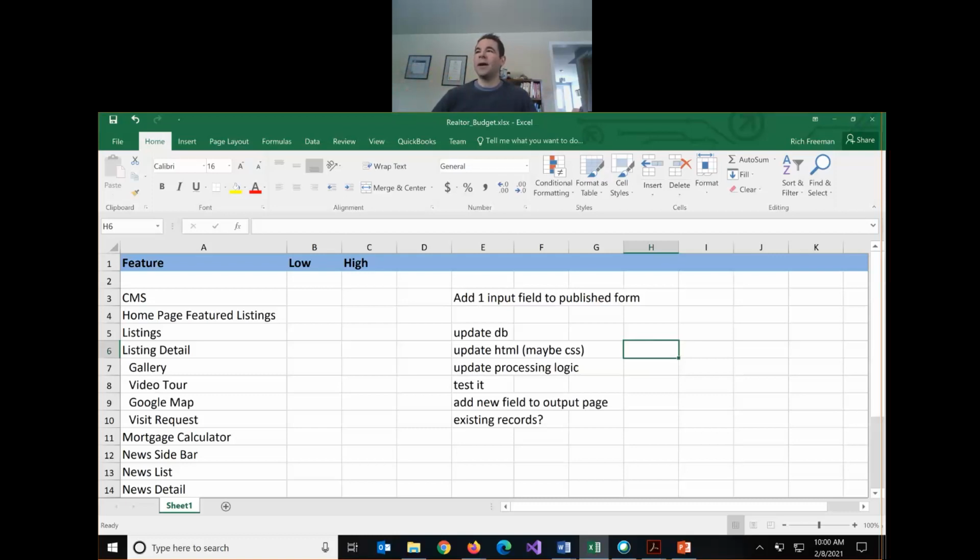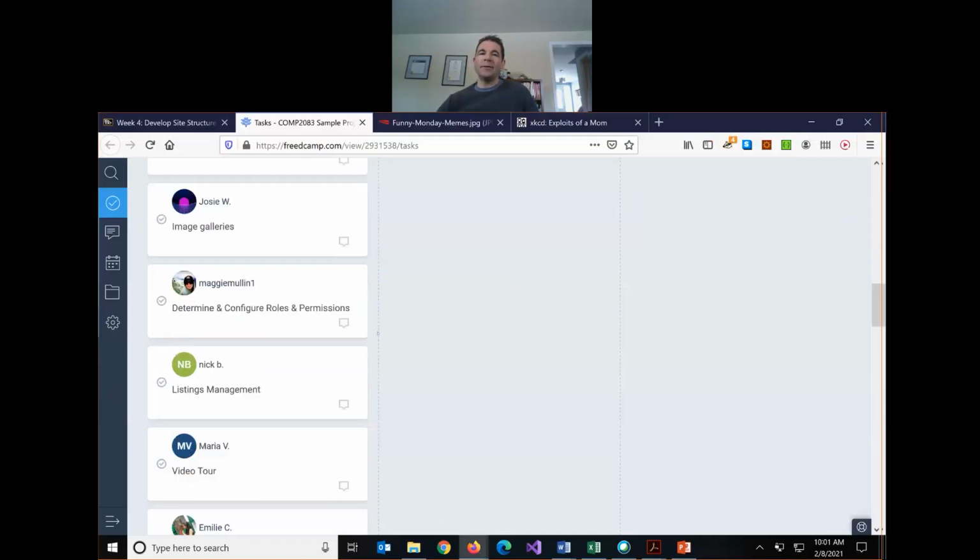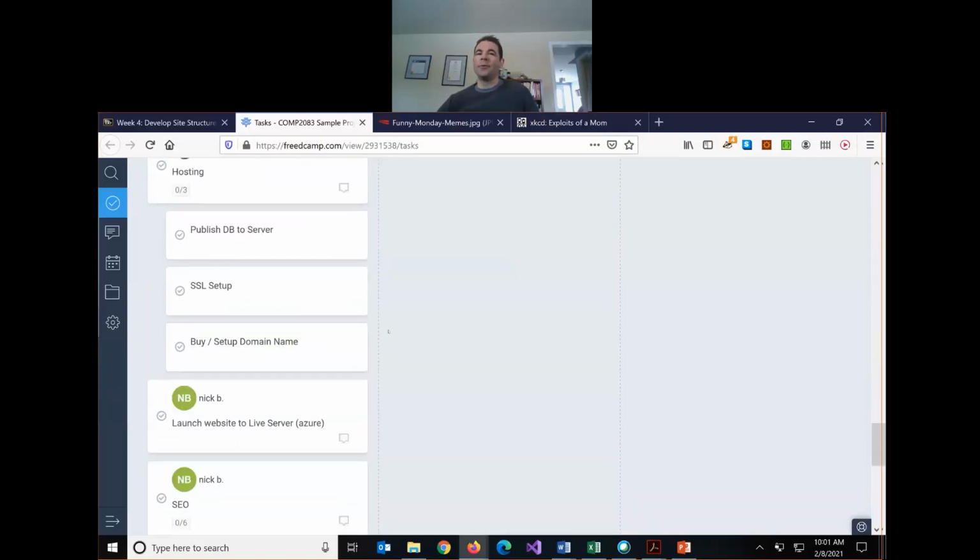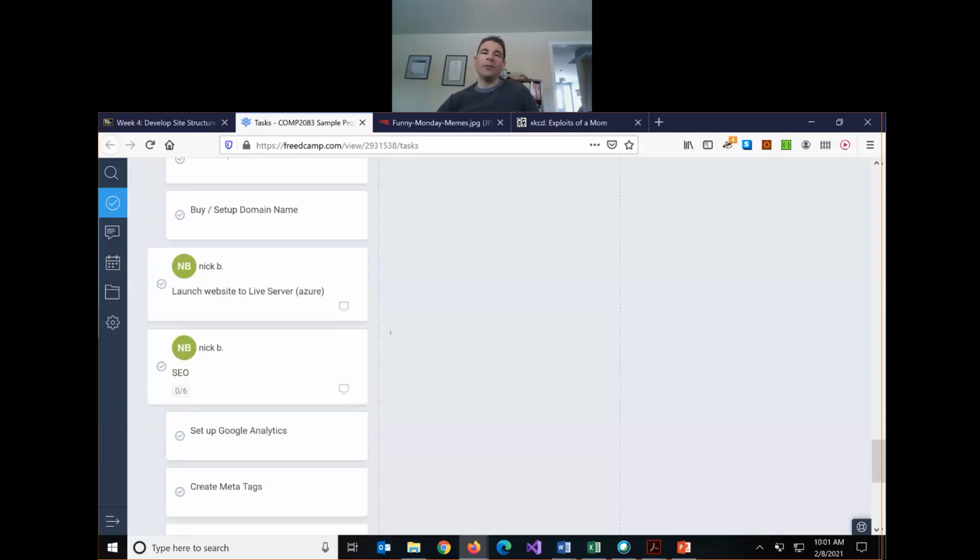So I'm pointing this out to come back to Nick's point about it seems easy, these things seem basic, but when you actually break down all the work involved, typically this helps us realize things are a lot more work than they might seem just from looking at the end product, because so much of what we do is not visible to people. So doing this sort of really detailed breakdown really helps us. It helps us quote accurately, but it also helps us manage the work in the project.